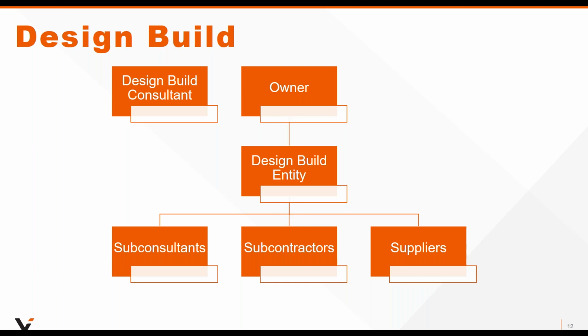We do have firms who routinely do design build, but from what we can tell, the consensus is that the frequency for design build type projects is lower than when compared to design bid build, so we don't get as many claims, probably because these issues tend to get worked out before they develop into a claim. But when there is a claim, they tend to be higher in severity than a design bid build project. So it really depends on the project. It depends on the firm's experience.